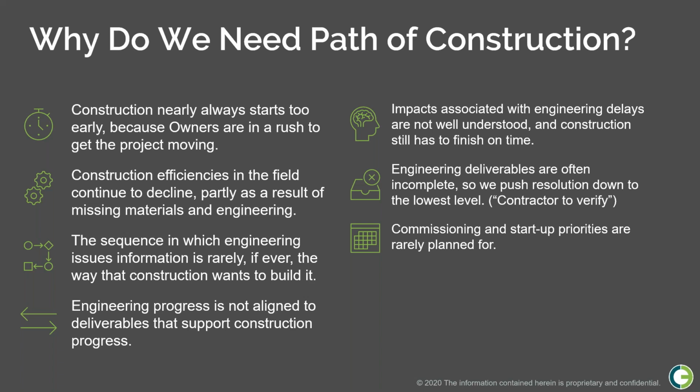But part of the reason for the path of construction is for us as construction personnel and AWP people to be able to educate engineering on a project by project basis to say, here's how we want it. We want to build it from left to right. So don't give us the stuff on the right hand side first, give us the stuff on the left hand side first.